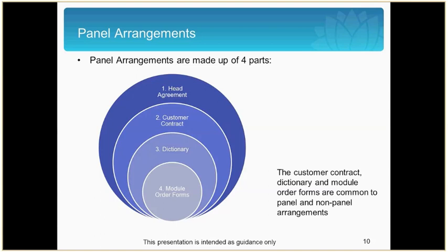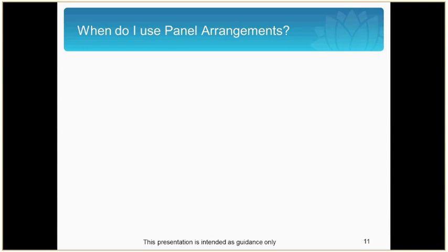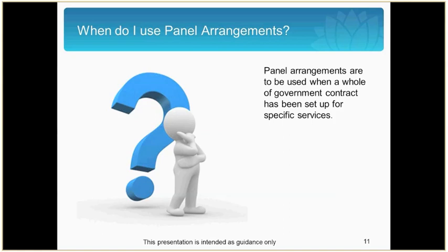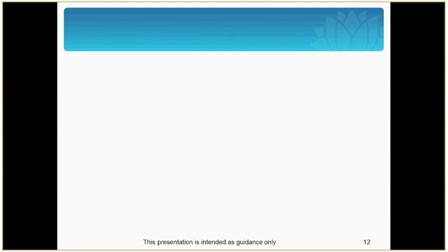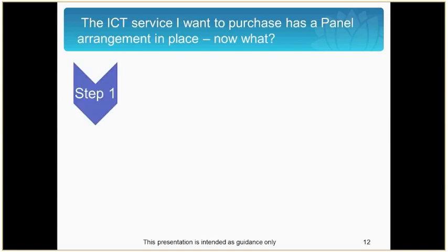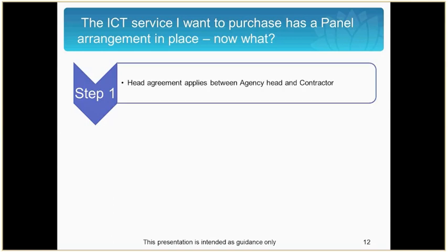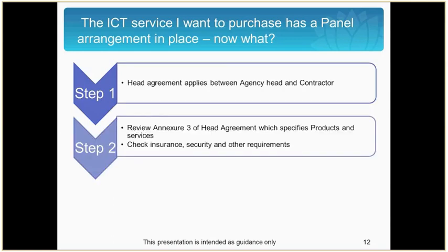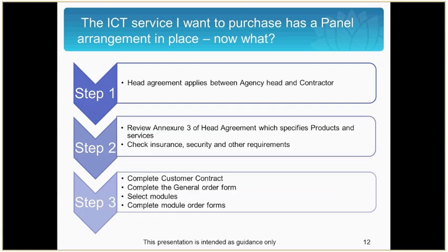Non-panel arrangements only contain the customer contract, dictionary and module order forms. You might be asking yourself: when do I use the panel arrangement? Non-panel arrangements are used when a whole-of-government contract has been set up for specific services. So if the ICT service that you want to purchase has a panel arrangement, the first step is to review the head agreement which applies between the agency head and contractor. The second step is to review annexure 3 of the head agreement which specifies products and services, and check insurance, security and other requirements. The third step is to complete the customer contract including item 7, and complete the general order form.